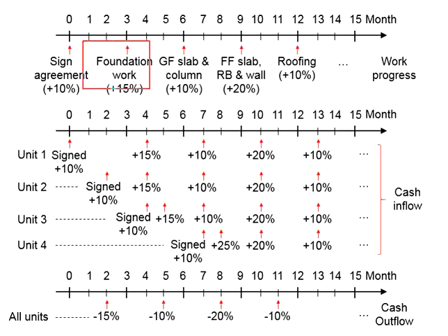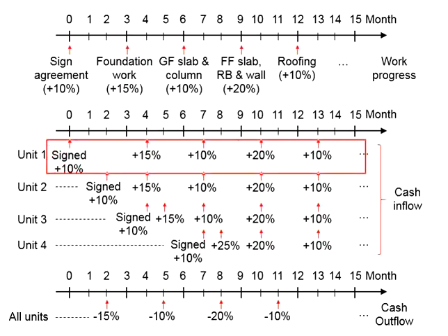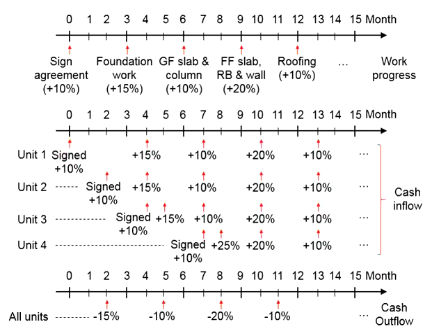When you have completed the foundation works, you receive another 15% 1 month later due to the considerations of the period of honoring certificate plus the administration's process of the issuance of the interim certificate. Same goes to the subsequent stages. Now this percentage will be on basis of the selling price of that particular unit.